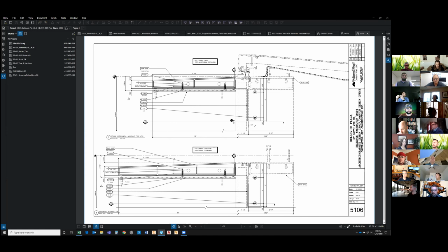That's cool. I think where we get tripped up sometimes is we'll get panel fabs or something updated, drawings updated, and then we don't give those updated drawings to the field. They're maybe working off older ones, because at times it's a lot of documents to keep track of. So if it's automatically done from the fab team or from drafting, that kind of bypasses the project manager entirely.